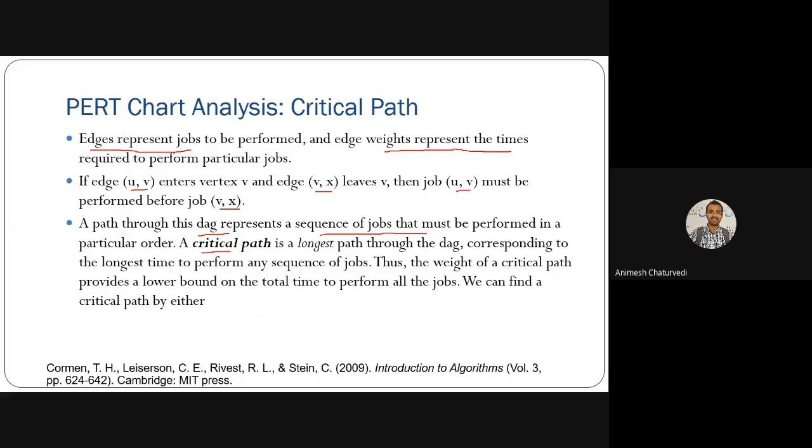Then we are interested in finding the critical path, that is, the longest path in the directed acyclic graph that is formed. The longest time would give us the time for any sequence of jobs, which means it gives us the whole time to complete the whole project. So the weight of the critical path is required, and that has to be analyzed for the total time to perform the whole job. All these things are required to find the critical path.